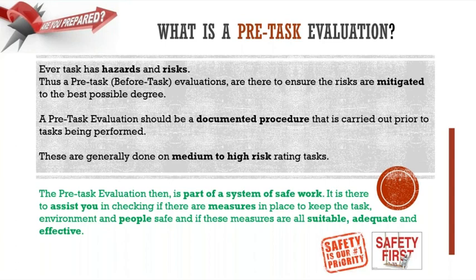The pre-task evaluation should be a documented procedure that is carried out prior to tasks being performed, very similar to a job hazard analysis. These are generally done, though, on medium to high risk rating tasks. Now, for you, you might want to use them on low risk tasks, and you're more than welcome to do that because no risk should be too low for us not to consider it. But the consensus in the industry at the moment is that medium to high risks generally have a pre-task evaluation. This is done as part of a system of safe work.